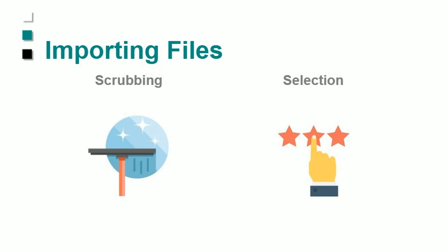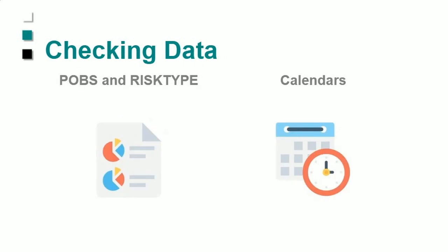If you're used to using P6, you know that some of the data elements that we've been struggling with for many years that make the files massive are the POBS tables and the risk types. The latest versions are dealing with that better, so that should start to go away if you get upgraded to the latest. But you might still have some stragglers, so we take care of those fussy things that can cause the files to be massive.